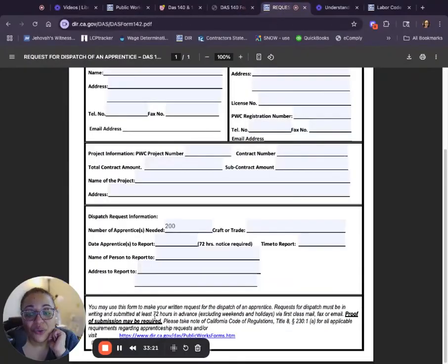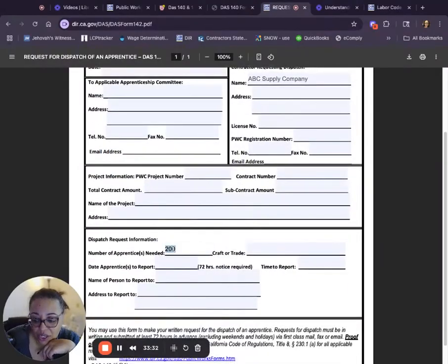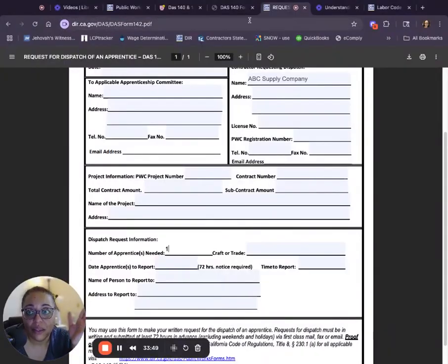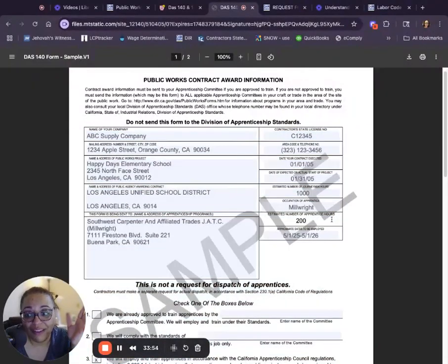And then with the 142, did you provide at least 72 hours notice to the apprentice council that you're sending it to, excluding weekends and holidays? Did you make sure you put in one apprentice, one apprentice, one apprentice? So just slow down and read. If you're getting stressed out, oh my gosh, I can't remember what to do. Number of apprentices, 1. Number of hours, not 1. There would never be 1 hour that they need. Because remember, it always said you had to have at least 8-hour increments.